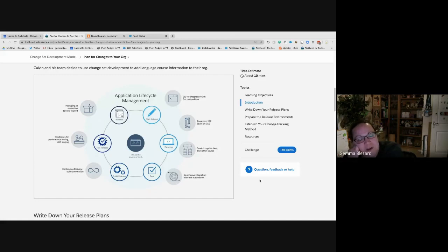And the idea of agile as well is you release regularly. You release a little bit at a time regularly, and you make sure that what you're building is shippable. So you tend to start with the minimum amount of functionality just to get people used to it, because as they start getting used to it, they will then talk to the product manager and say, wouldn't it be great if it did this? And the product manager says, right, we've got a new story, I'm going to put it up on the board. Next thing you know, it goes into the sprint. What are we going to build? So that's the whole idea, is that you're continuously building against feedback.